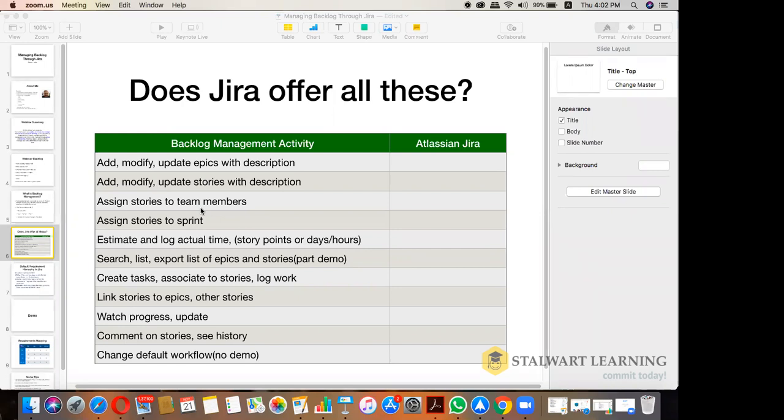And you will always like to clear your backlog of bugs. But one thing I always recommend to all teams is that bugs coming out of production which are high and critical in nature, as well as those coming out of your previous sprint or current sprint, should be taken on priority and should also be part of your backlog. Yeah, that's all.